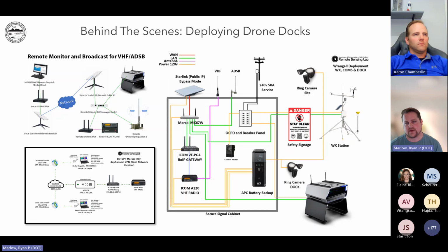A lot of our staff that are transporting these larger batteries, we are requiring hazmat certification, because when we fly out to these areas, we also have to package them back up legally, which requires, once again, more work. So we are solving it through compliance, building the correct containers, and working with air carriers, as well as how we respond, and pre-deploying batteries with these assets. So it's kind of a risk game of where you put those variables moving forward.